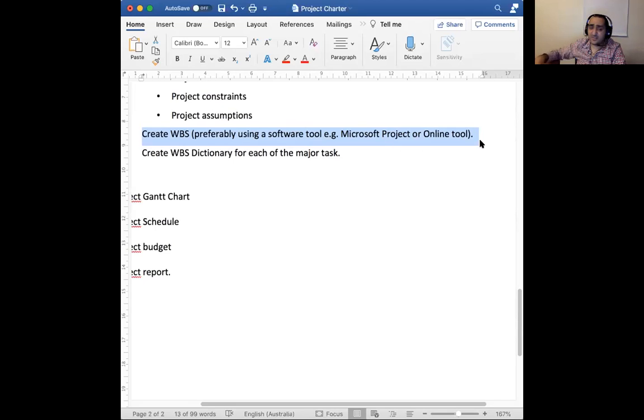And what are the activities that I need to assign to people to be able to do the building of the house? Once you create all of these, what we call work packages, to assign to people, to assign a start time and end time, this is when you can get a budget. Because, you know, I put Fadi to work on this task. Fadi needs to work for 7 days. Fadi gets paid $1,000 a day. That's $7,000 for the 7 days that Fadi needs to work.